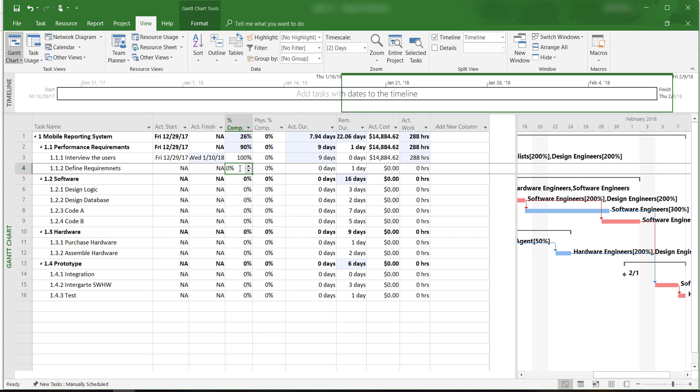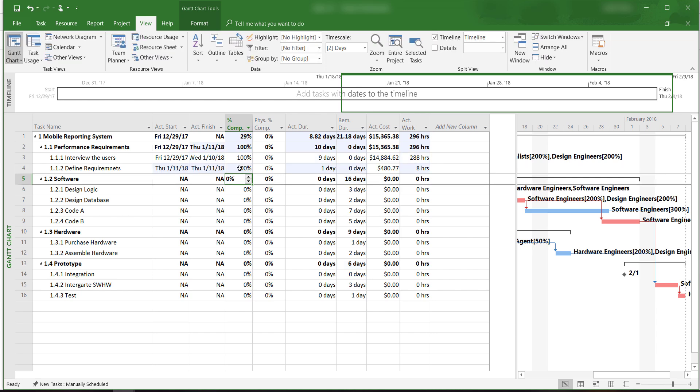Define Requirements is also 100% complete, and it took us 1 day as we scheduled. Note how the software automatically adjusts the start date for this activity to coincide with the predecessor tasks.